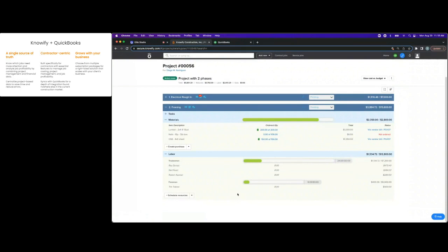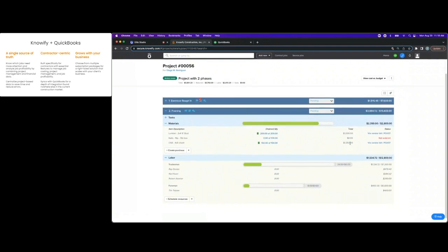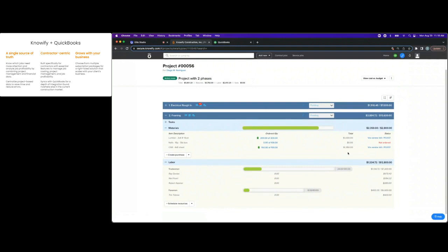So as things change, as prices change for labor and materials and construction, I can always still see how many hours it takes me to complete jobs like this, how many materials I needed to buy to complete this. So regardless of what the dollar figure is, as a contractor, I'm going to have a really good ability to budget all of these jobs as we move forward, just by referencing how things worked in the past.